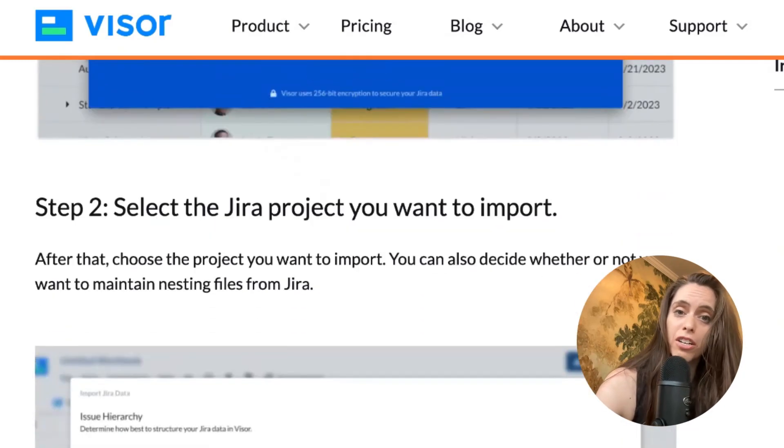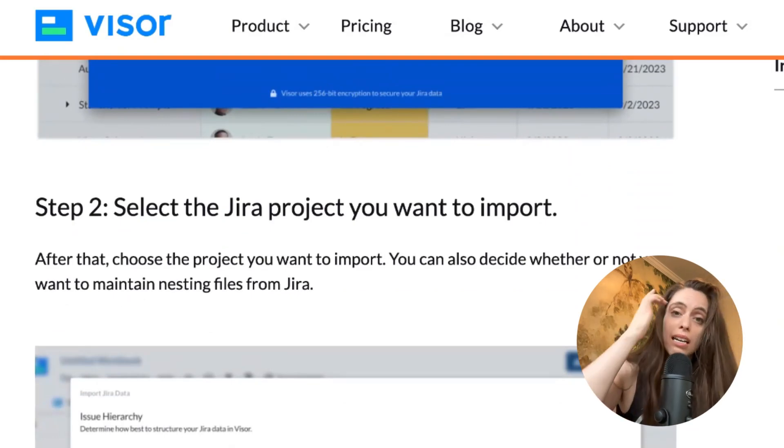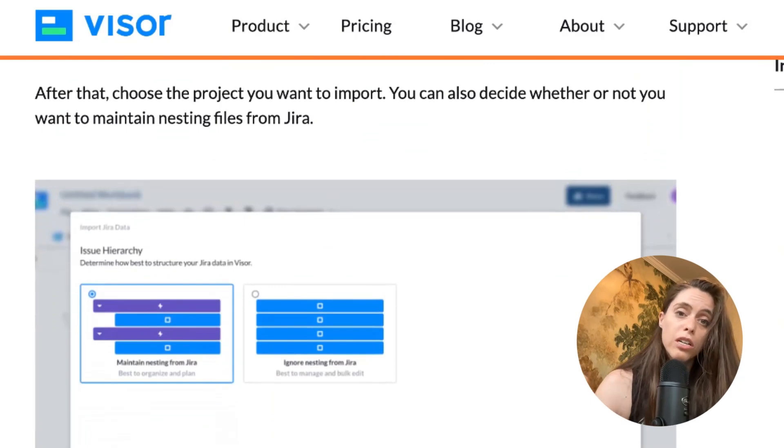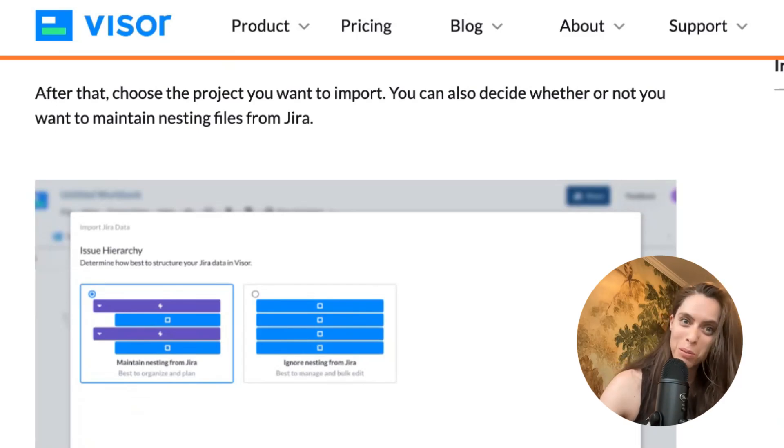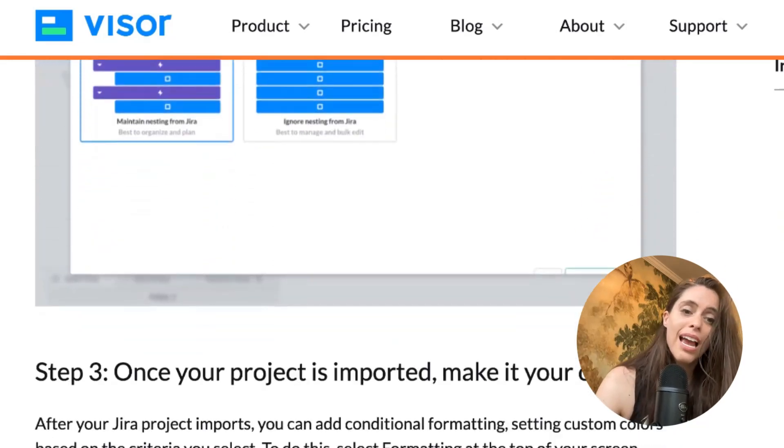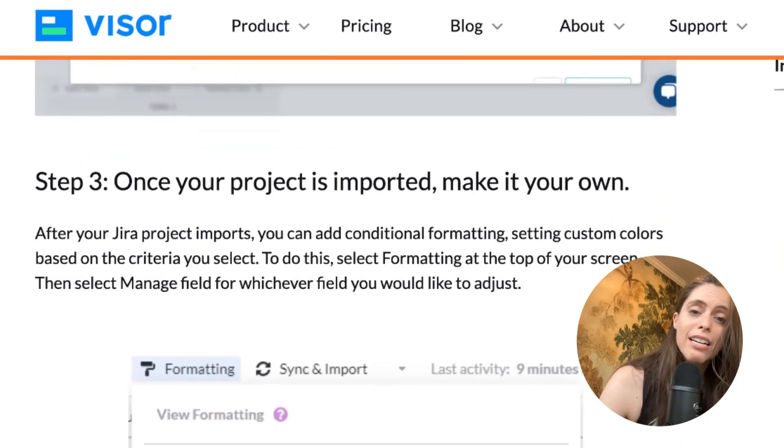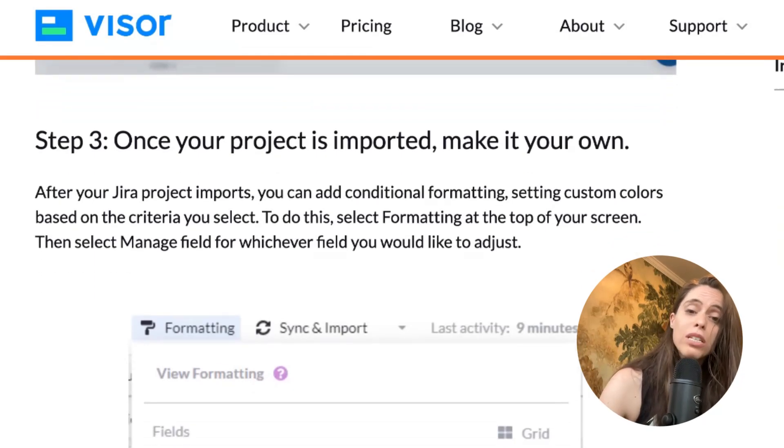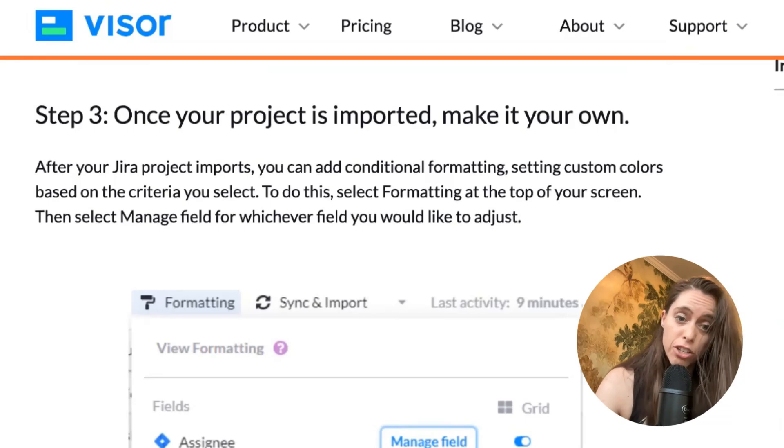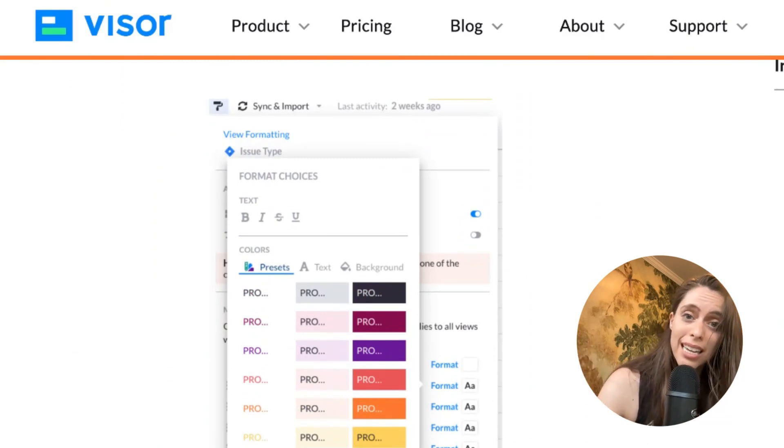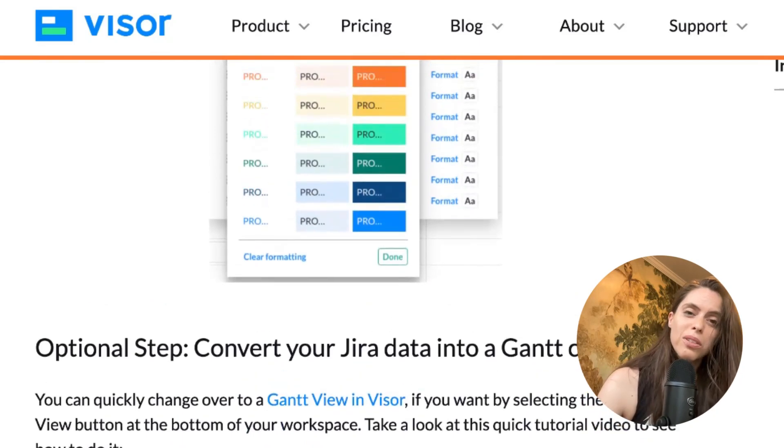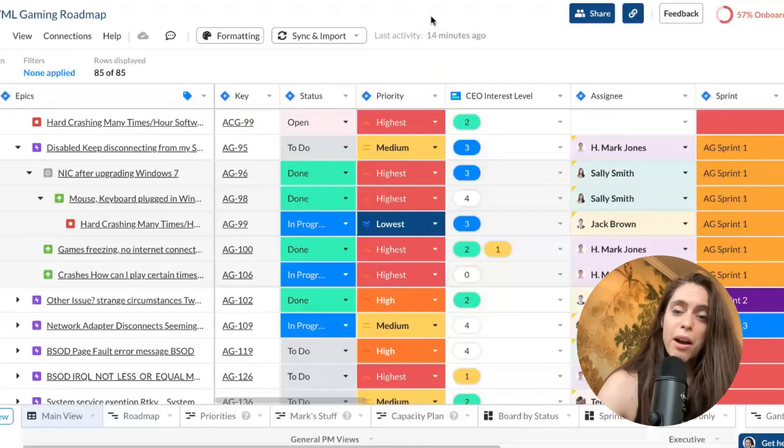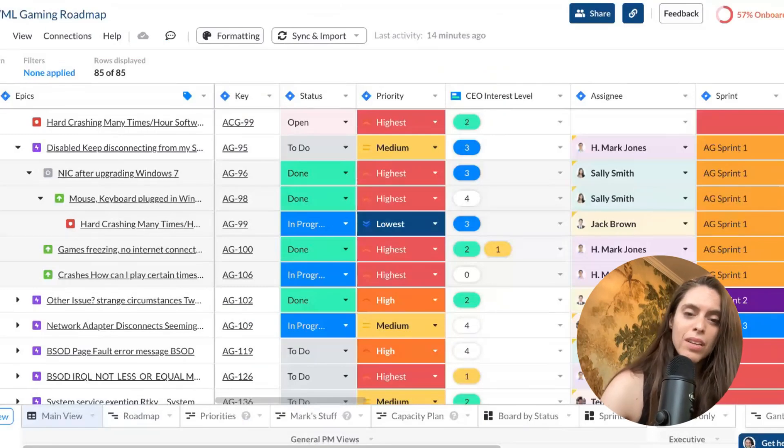And from there, you'll then select the Jira project you want to import. You can choose one Jira project, or if you know JQL, you can bring in more than one Jira project. You'll also be asked to choose whether you want to maintain the Jira nesting or ignore it. Most people choose to maintain it. That way, your spreadsheet will have nested hierarchies exactly like Jira does. And then once your project is imported, you can make it your own. And so when you're importing, you can choose the Jira fields that you want. We accept over 75. And once they're in there, you can add custom fields in Visor to complement and enrich your Jira fields. You can also add conditional formatting all the way down to the exact RGB colors that you want to make a really colorful spreadsheet or roadmap or Gantt.